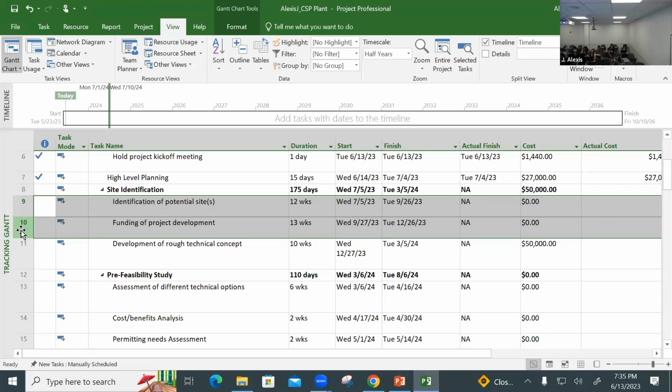In other words, you set the baseline when all your activities have resource assignment, except the milestones. You have no over allocation, and you have calculated and have contingency in your plan. Those three things are extremely important. Resource assignment is complete, no over allocation, though you can pay attention to under allocation as well, and you have contingency in the plan. That's the only time you can set a baseline.